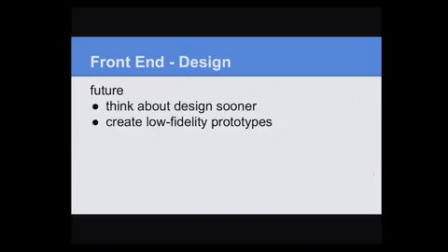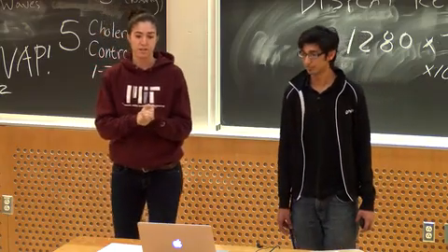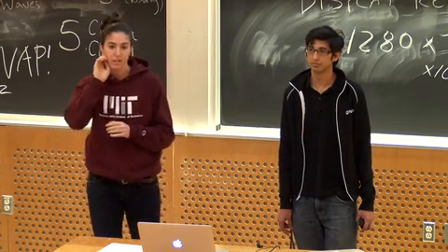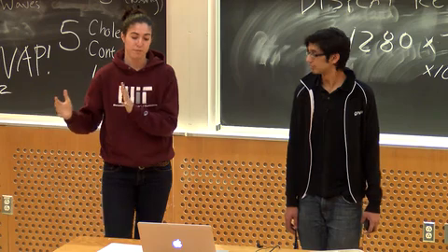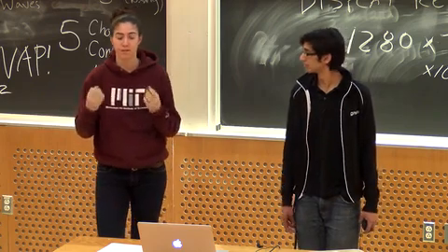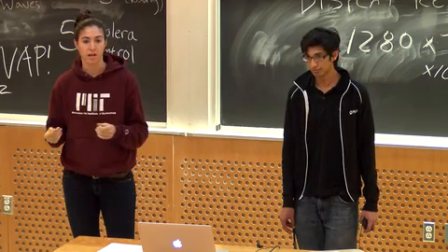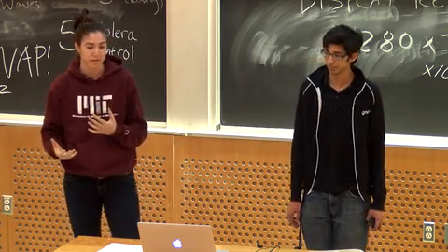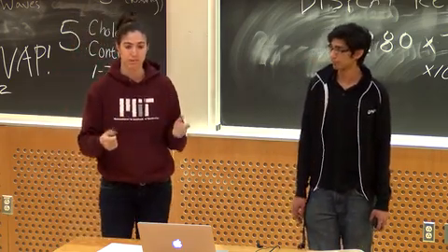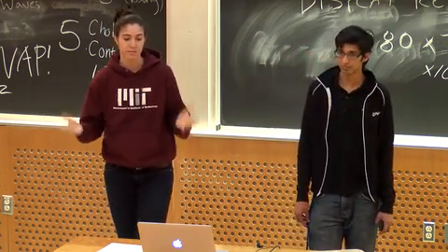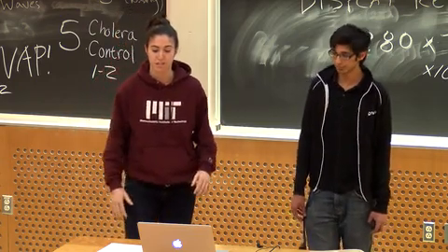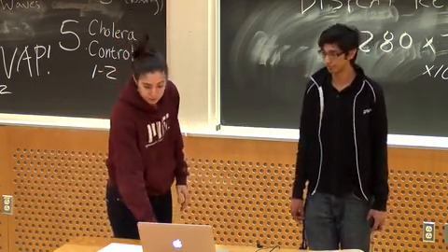Basically, I think for future projects for the front end, we definitely need to think about design sooner. This process happened really slowly and really close to the end. We were very focused on the functionality of our game and the mechanics, and not a lot about the player's interaction with the game. It would have been awesome if we did some prototyping early on, because we had some other ideas, and we just never put them into fruition, and we never tested them out. So it would have been interesting to make those and see what users thought of them.